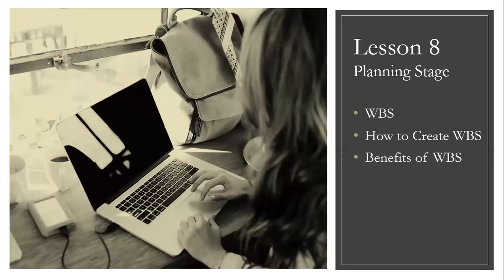But when it comes to the WBS, it is not written or documented by the PM alone. It's a complete teamwork. The entire project team works together like a workshop, and the duty of the project manager is to facilitate that workshop, to ensure that all the ideas are on the table, the entire scope is on the table, and to put them in levels. We'll come to the details of what exactly is in a WBS, then check how to create the WBS, and finally the benefits of the WBS.